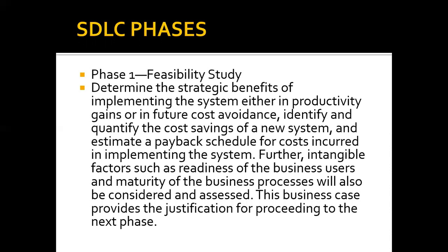Okay, so SDLC basically has 6 stages, all right, starting from phase one, the feasibility study, right? The feasibility study answers the question, do we really have a problem? Because it's possible we don't really need software, or we don't need to buy software. There may be another software within the house that may solve the problem we're trying to solve. Maybe you just rearrange some things, or you need to upgrade the software you are using now. So it's not every time you just rush to the market. And that is what feasibility is.